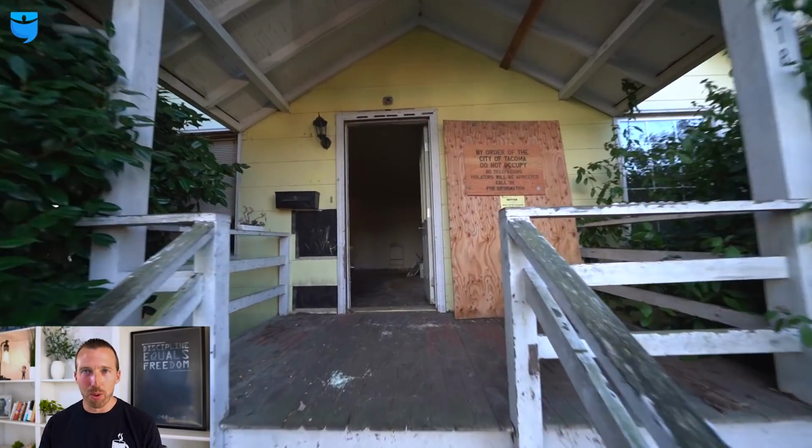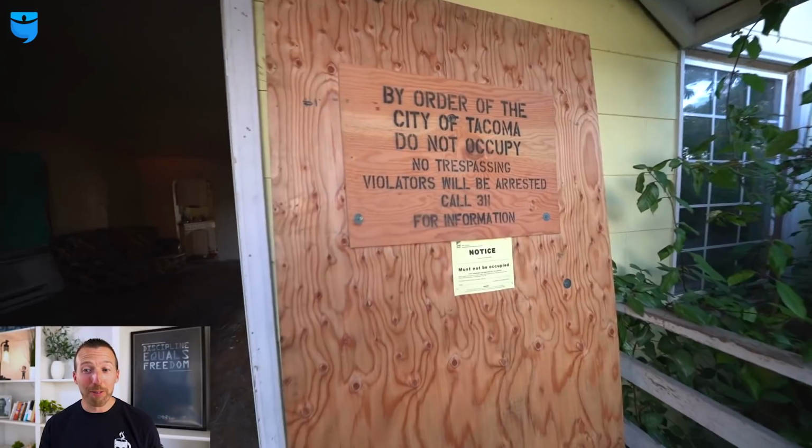So before we go through the front door, we already catch one of the other red flags, which I didn't bring up in the beginning. This is all over code enforcement right now. So that is actually a red flag. If you think it's just easy to get through code enforcement, it's not always easy. A lot of your local cities have a lot of processes you got to get through, the red tape, to be able to work on the property to begin with. For them to turn power back on, all that great stuff, you got to go through some hoops. So this could be a major red flag if there's a bunch of back charges and costs and fines and fees that you might not be aware of. We had a lot of experience with Tacoma code enforcement, so there's things you can do through escrow before you close to make sure you're protected and do it right with most code enforcement agencies. But still something you have to deal with and you just can't ignore, or else it's going to bite you in the ass later.